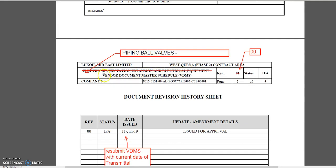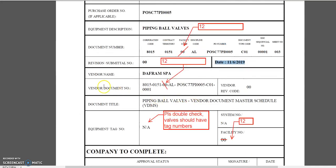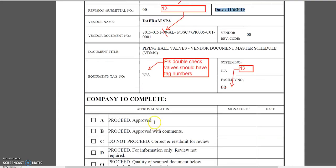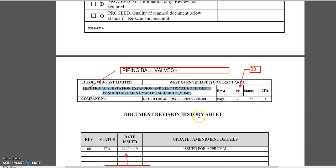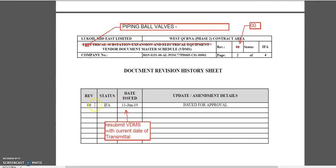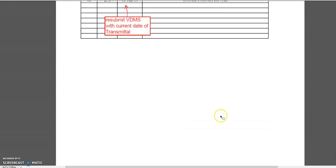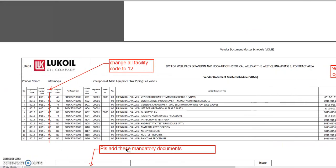Piping ball valves — whatever the vendor document item is here, it must be the same here. So piping ball valves, vendor documentation methods schedule. What is the revision? It's zero-zero, so this is not revision one. Revision 01 is always issued for approval — IFA. So the status must be IFA; it has to be resubmitted to VDMS with current data, transmittal issued for approval.